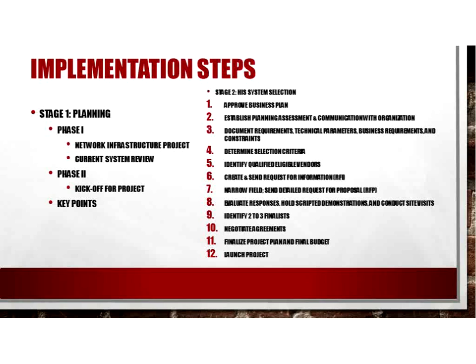So you might identify a full list of potential vendors through industry connections, research, and all those types of things. In step 6, develop a request for information, including the desired rules of engagement, and send it to potential vendors. So your RFI, that's your request for information.